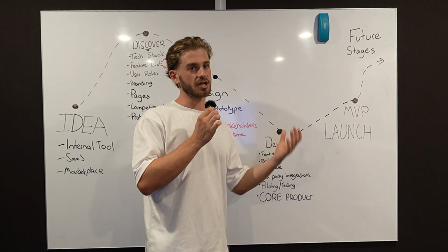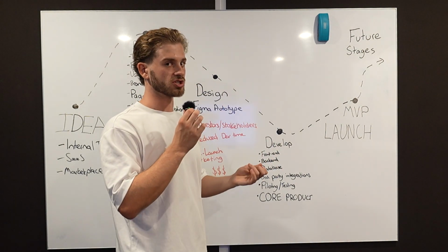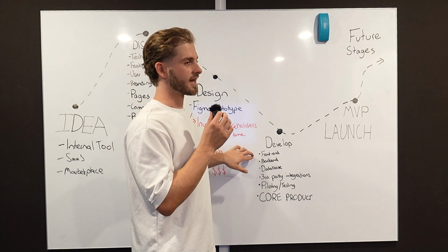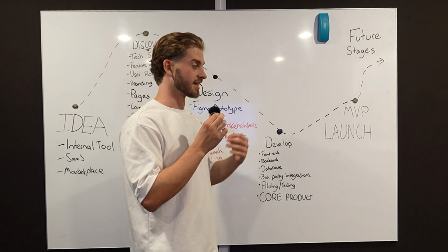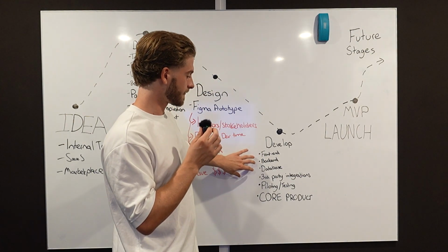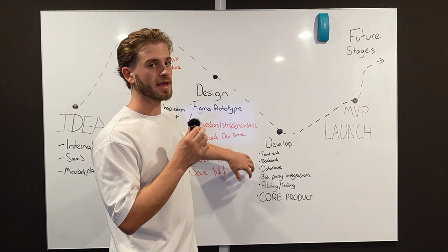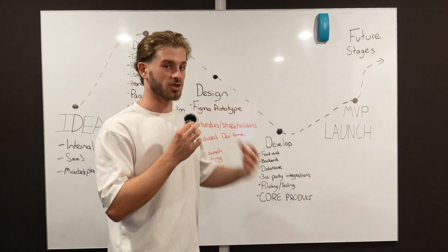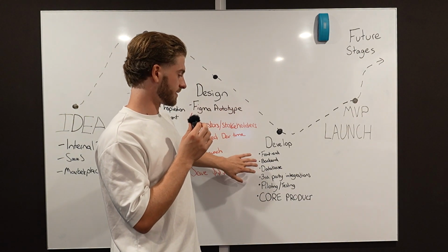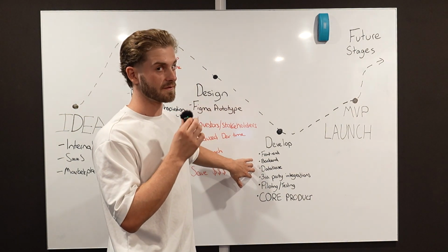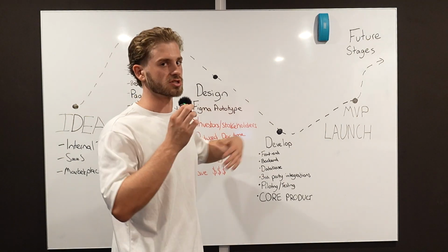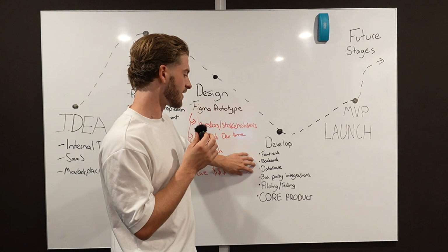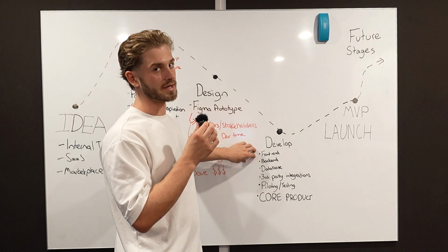Front-end stuff tends to be a bit cheaper. It's usually design changes, copy changes, navigation changes. This, I wouldn't focus too much on in your MVP. Design changes, at least for us, are probably the easiest change out of these 4. And so what we try and focus on for our MVP launch is getting the functionality of your app, which is mostly back-end database and third-party integrations, done first, and then we can change design pretty quickly and easily whenever you want. So we really want to deliver functionality first, make it look pretty second.